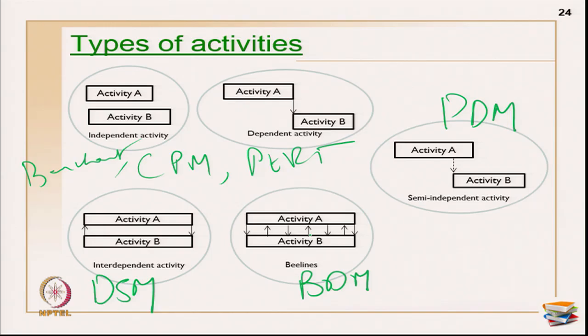Okay. But one thing you should understand, these are all primarily under the classification called natural overlaps, wherein the information can pass on easily at that time and you are scheduling only with that knowledge. Okay. Suppose if you want to force activities to release information ahead of something or behind something, and then you want to schedule a project, then you may have to do forced overlap. Okay.